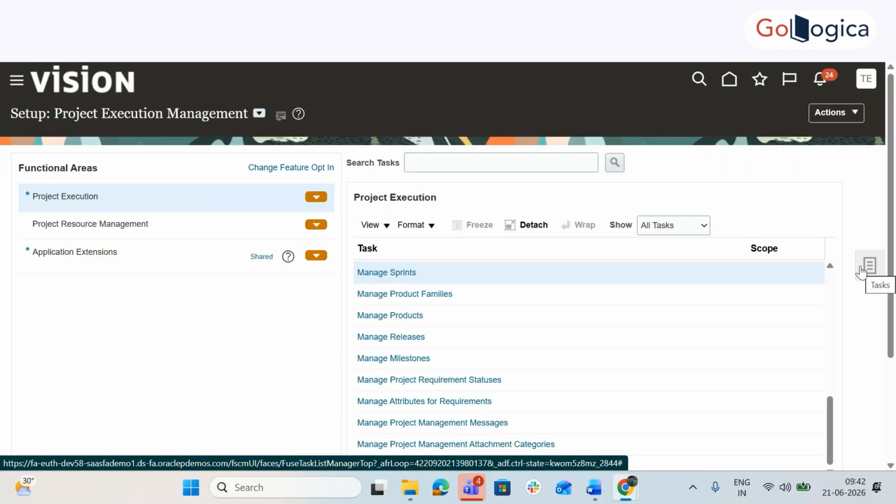That time they come up and tell you, no, no, no, this is not how it should work. And already we have spent like 1.5 years. That became a problem. Now we should change the solution design document. We should take the approval. If there is any other report required or integration required, any RICE objects, so again, we'll have to take the approval. We have to bill them. They will negotiate. That becomes a major problem.